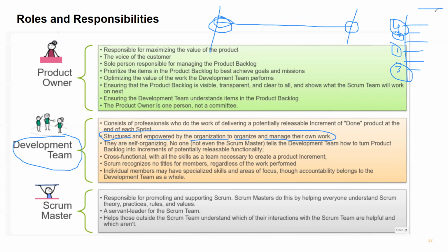Okay, so in order to be secure, what will you do? You will have a login page. Correct. Assume that this is priority one, login page. After you log in, what will you do? You need to draft the email. Correct. That is second priority. This is login, this is draft, and then you need to send that email. Yes. Send this email. This is third priority. Once you send it, you need to verify the other side whether he has received it, or you can see it in the sent emails box, right? Yes. Okay, this will be verifying, fourth priority.